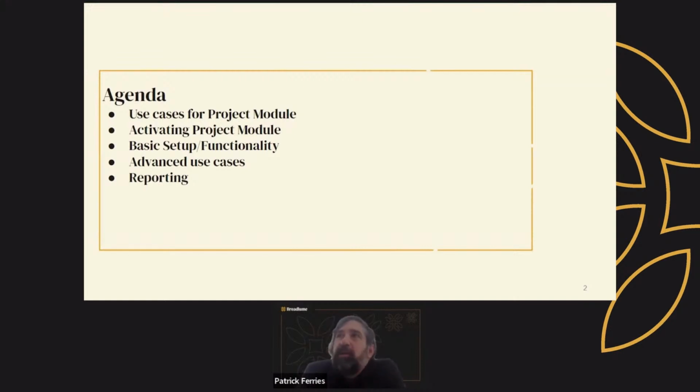Think of this projects module as basically a way to combine or aggregate jobs together for job cost reporting. On a commercial job, it could be huge, with several phases and many jobs in the system. On builder work, maybe you do one job per trade. And on residential, maybe you have a soft surface job and a hard surface job if that fits your business structure better. Either way, the end game is that the projects module helps you combine all that so you know what you made on the entire project, not just one phase of it.